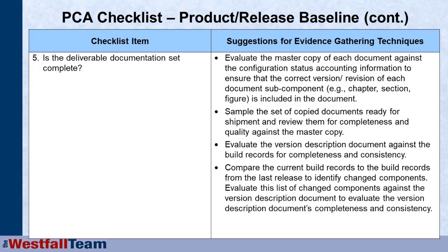My husband prints all of our training materials in sets of 6 because that's how many bins there are on the printer. I always take a nice judgmental sample. I pick the 6th one out of every batch and walk through and make sure the right version, the right revision of each chapter, each appendices are there. This is making sure the replication process worked correctly. Again, all the parts are in the box, because it would be very easy to potentially fumble finger, hit a 5 instead of a 6, so the 6th copy ended up without a chapter or without an appendices. So I always make sure that those are complete and available.